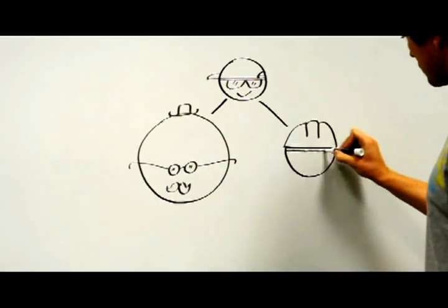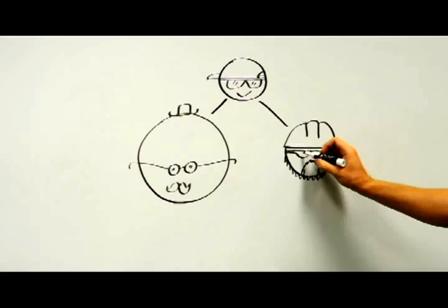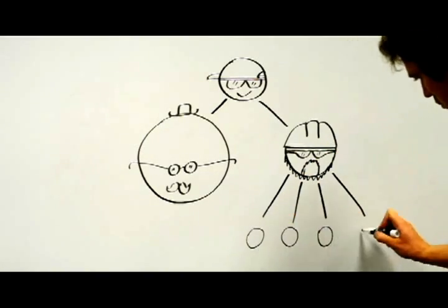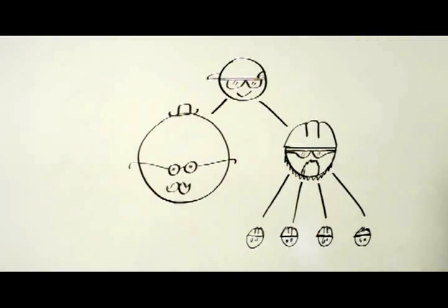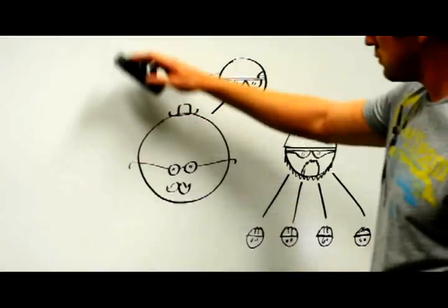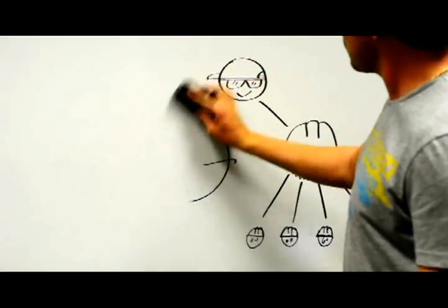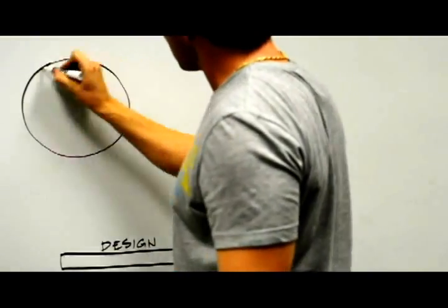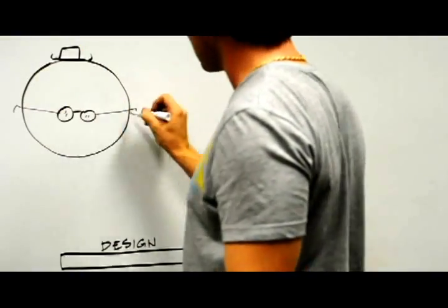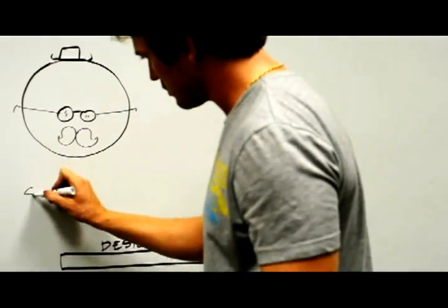In most projects, each of them can also form contracts with consultants in the case of the architect or subcontractors in the case of the general contractor. The traditional method differs from other project delivery methods in its three distinct and, most importantly, linear phases: design, bidding, and construction. During the design phase, the design party will first carry out a schematic design, or SD, the goal for which is to arrive at a clear concept.